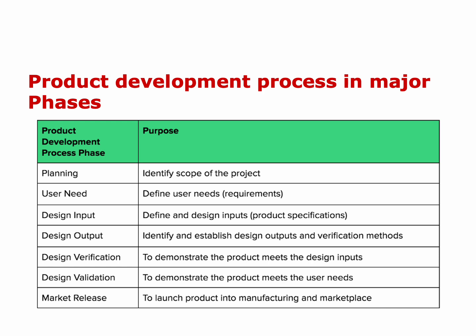And here we are going to do the planning, and this is a way to document the identification and the scope of the project. So we write down, we would like to have a medical device that is having these functions, going to be used for this type of functions, this is going to be used by this type of patients, and it needs some type of training or some type of maintenance or calibration, etc. This is the planning, and we are going to identify the scope.